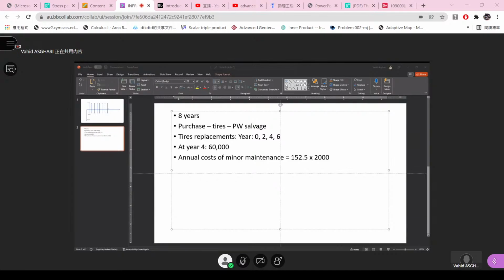For option B, I want to highlight this important point, that if you remember from the last session that we talked about in the class, the timelines should be equal. The first one has an 8-year horizon, but the second one has 4 years. So you need to repeat it 2 times, or you need to repeat it another time, so it will be 8 years.